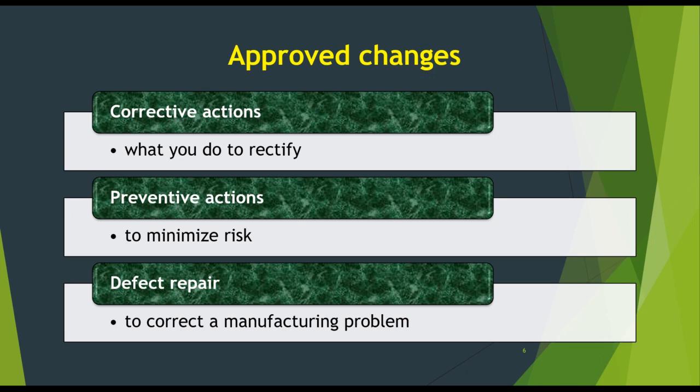Performed approved changes — the first one is corrective action, which means that problems, mistakes, or errors have already happened. During corrective action, after the error occurred, we are going to rectify the given error. Preventive action means to act before the error occurs, like to minimize the risk. And defect repair means to correct any manufacturing or service problems.